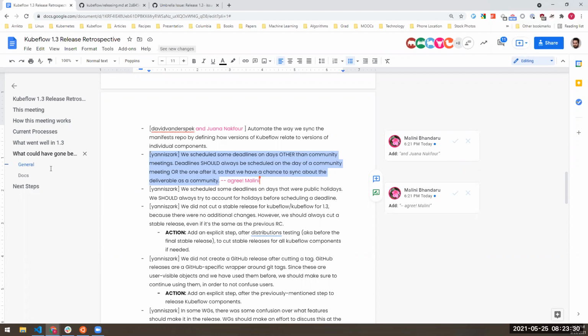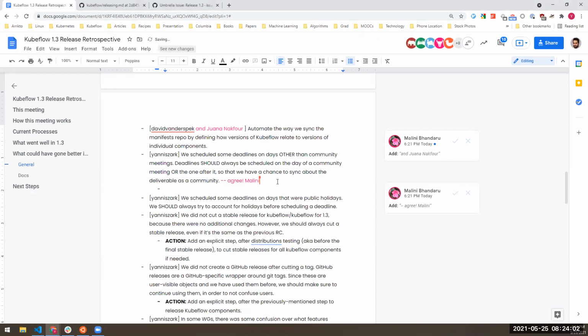I think it makes sense to schedule a date on the exact day of the community meeting. If we schedule one day after that, I think it also makes sense, but it probably has some risk that people are trying to chase the deadline. So they focus on the work instead of joining the community meeting, and you get lower attendance during the meeting. Then people say, oh, let me meet the deadline of Wednesday, so I have to skip the Tuesday meeting. And then we lost the opportunity of talking with them and trying to engage more. But in general I agree with aligning the meeting day with the release day, as long as it's not a Friday release day, it's okay.